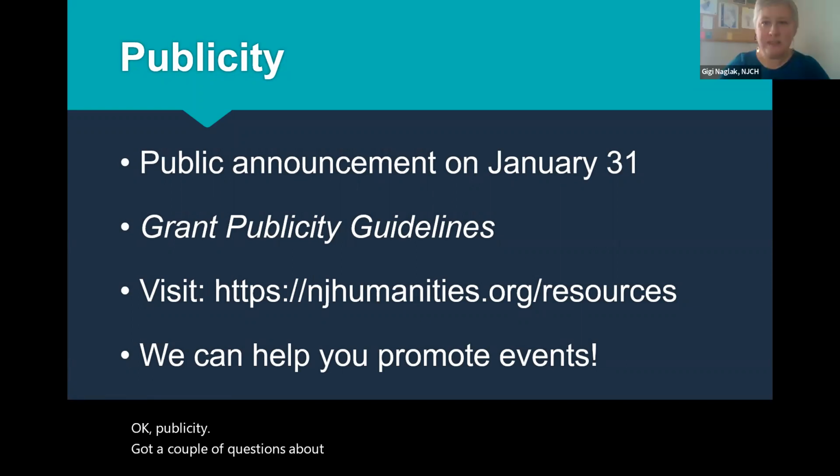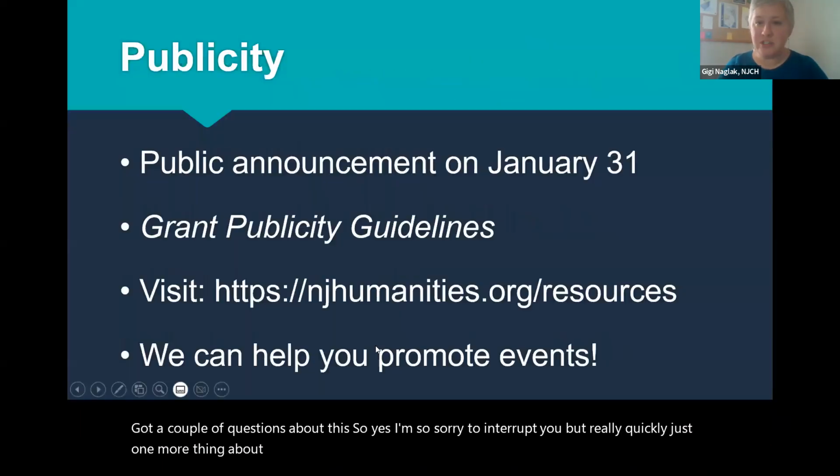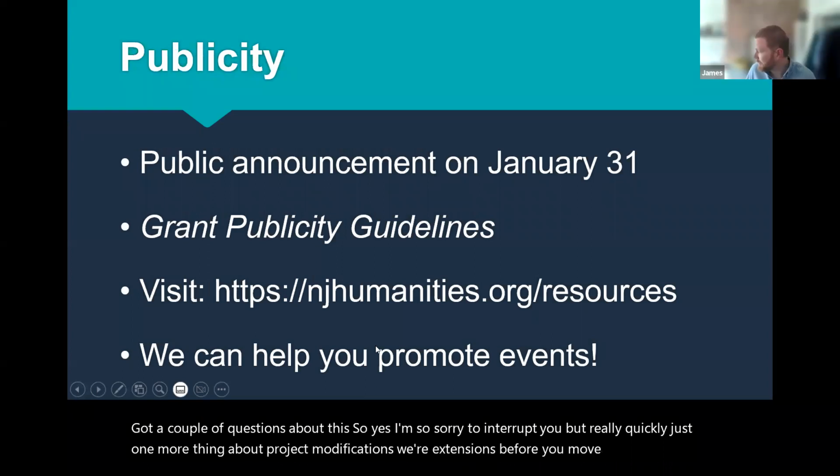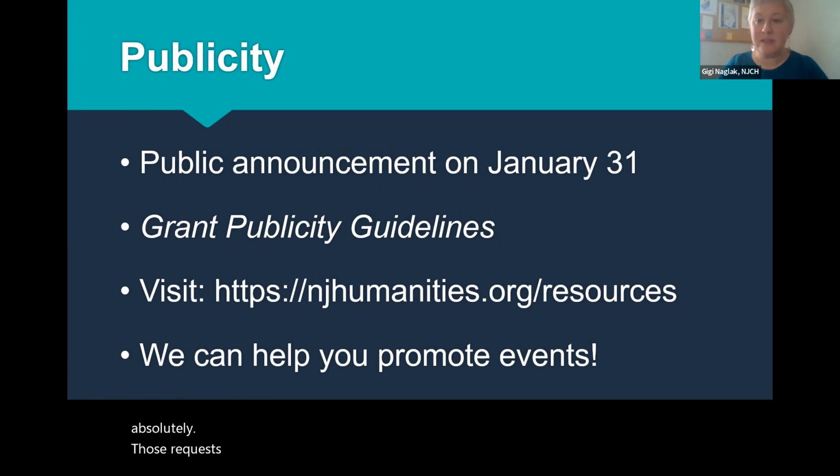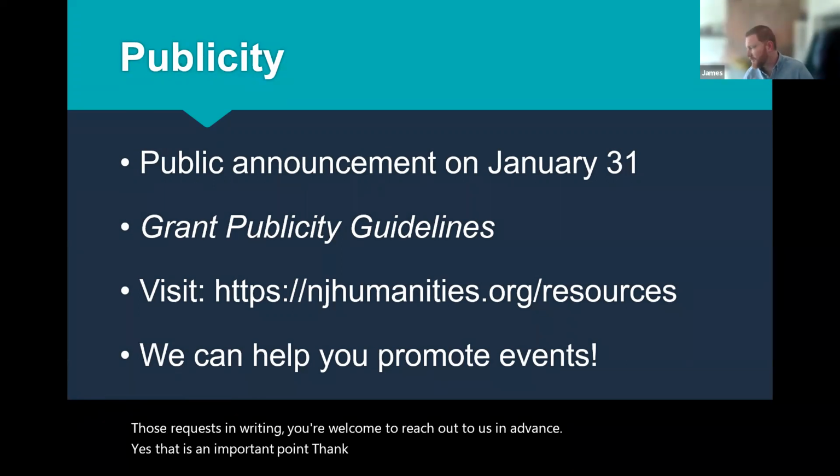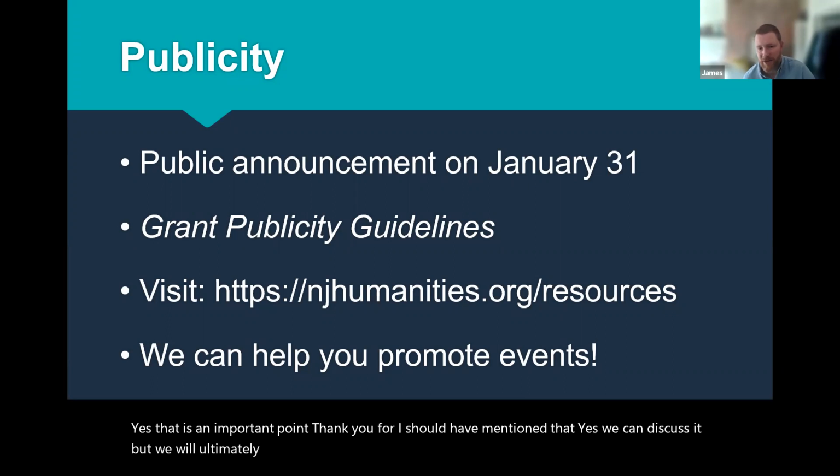Excuse me, James. Yes. I'm so sorry to interrupt you, but really quickly, just one more thing about project modifications or extensions before you move on. Yeah, absolutely. We ultimately need those requests in writing. You're welcome to reach out to us in advance, but they do have to be written. Yes, that is an important point. Thank you, I should have mentioned that. We can discuss it, but we will ultimately need all these changes in writing to approve them.